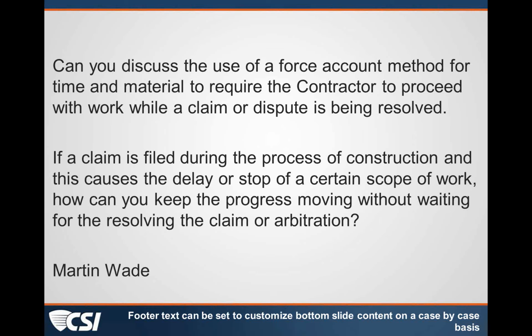The forced account method is basically what AIA documents would call a CCD. It's where you have not agreed to the cost for the change, but the contractor is forced to proceed with the work, and you work out the dispute in the dollar amounts later.